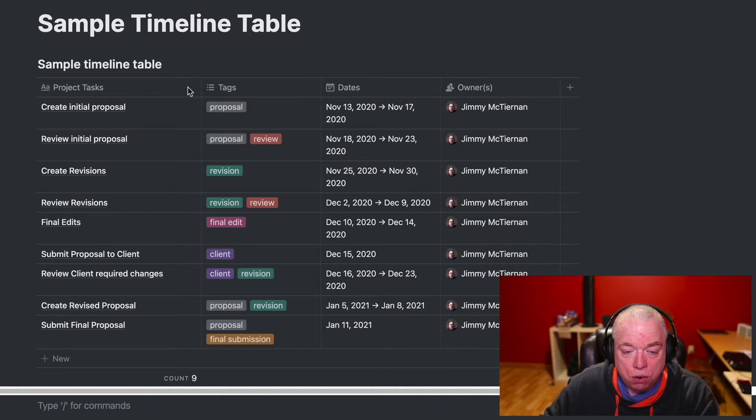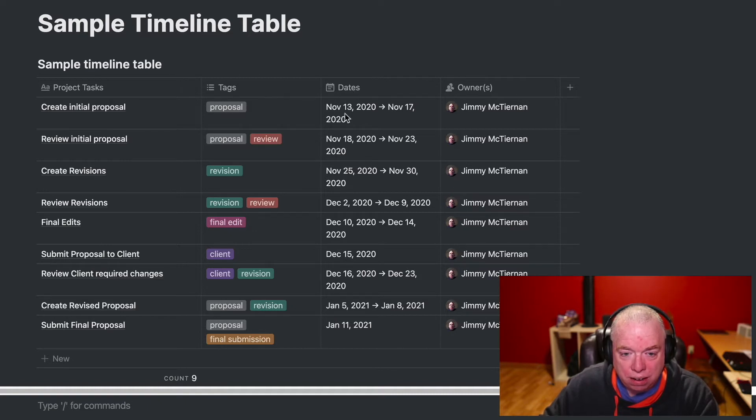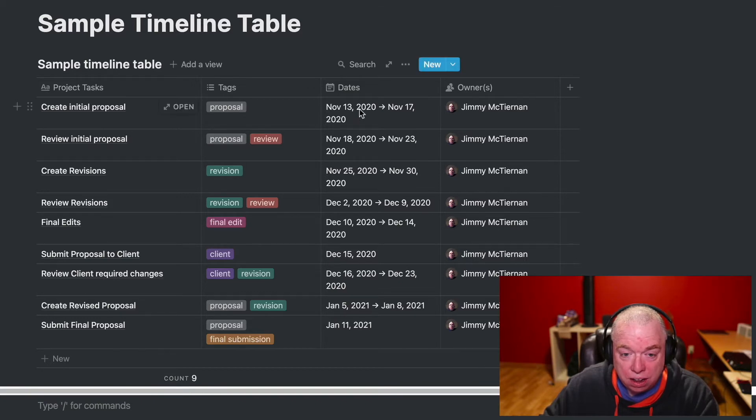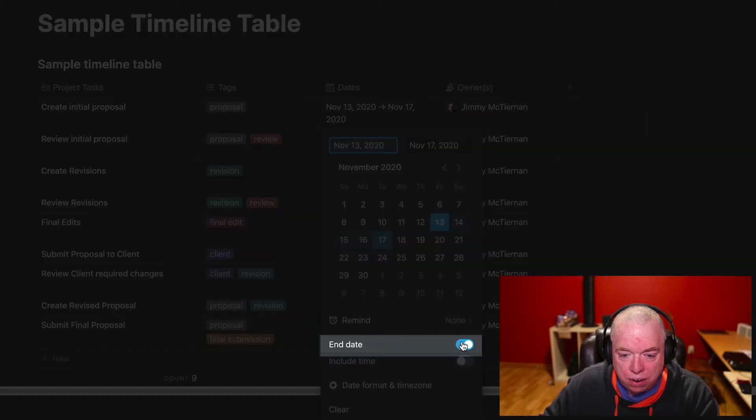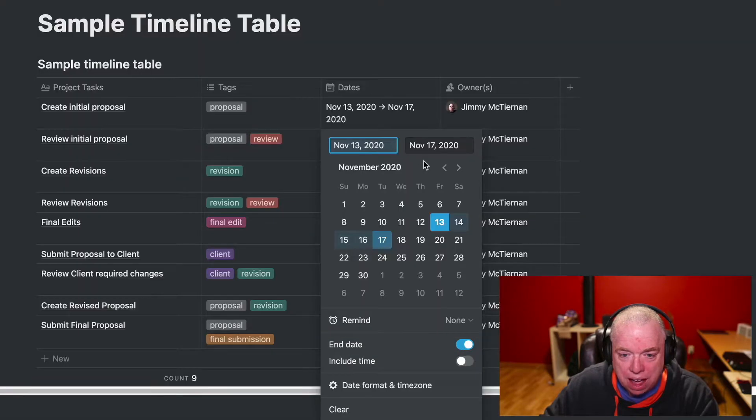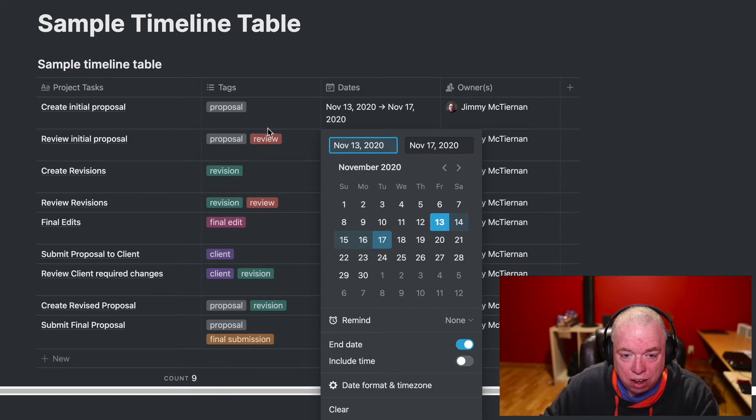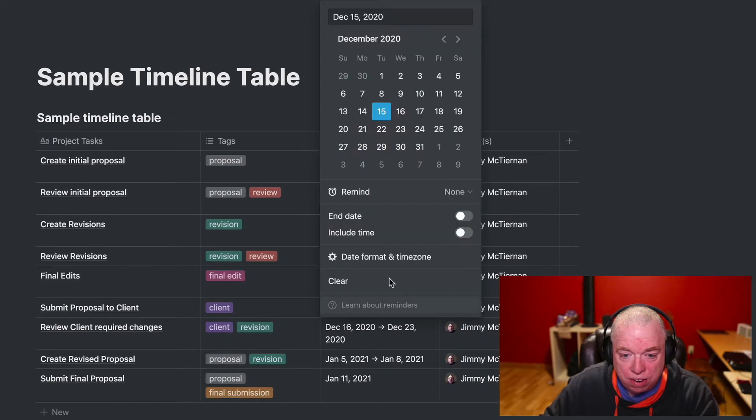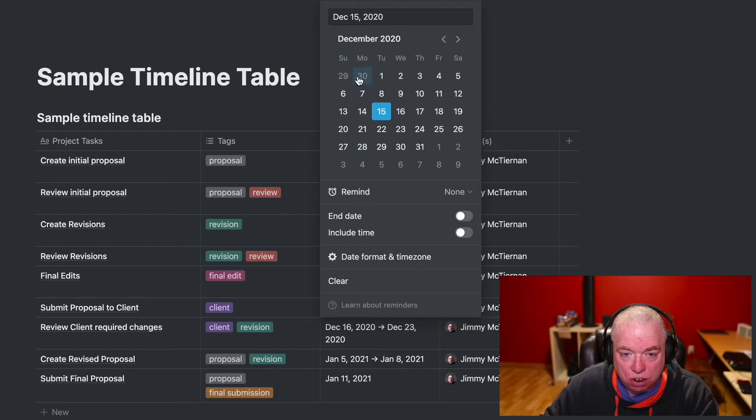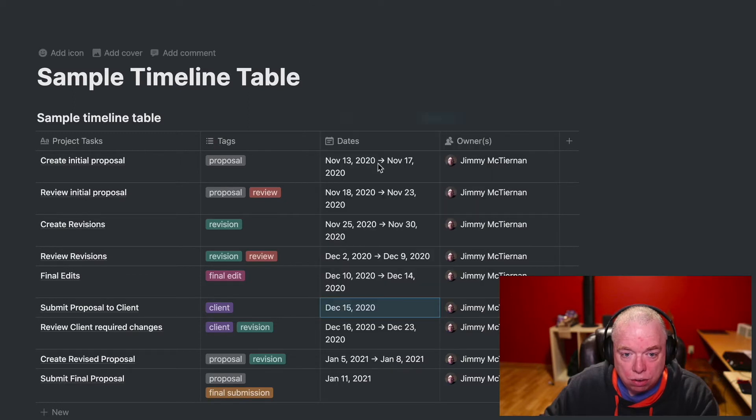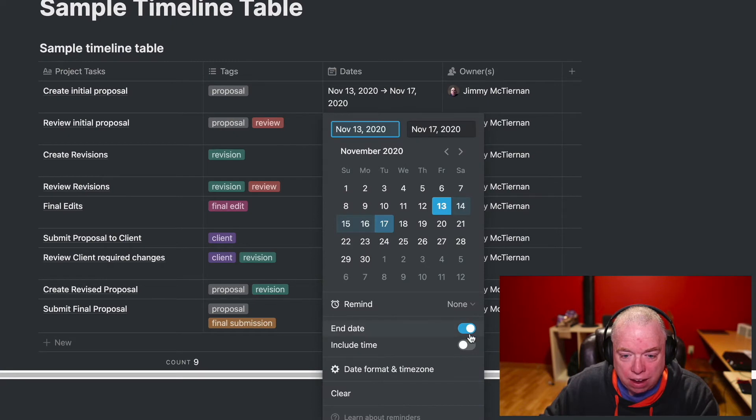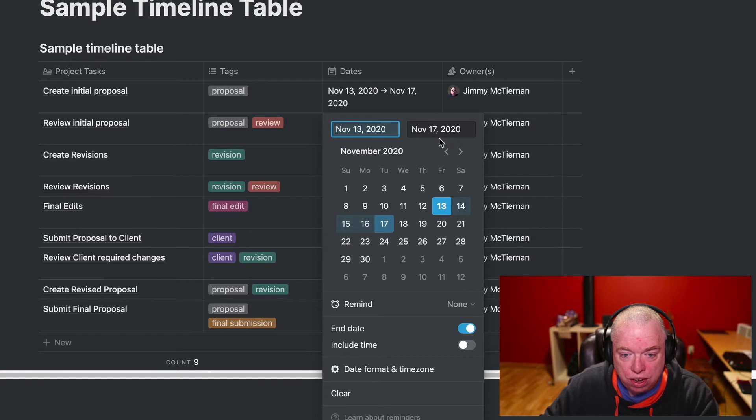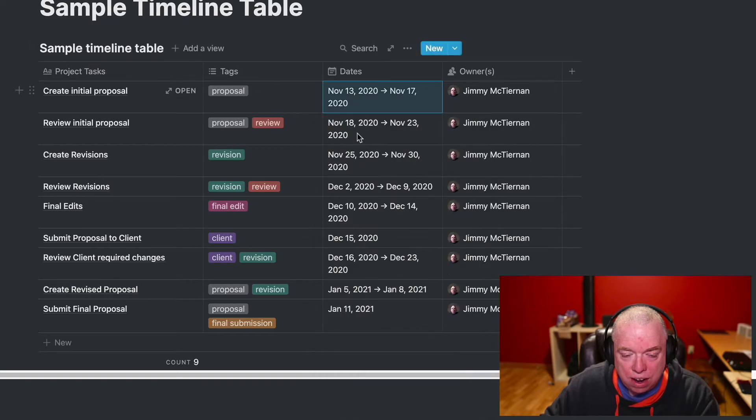The way you create a date range in Notion is to create a date column, just like you would if you just had a single date. Click on it, and then down here where it says end date, when you enable that, that enables this secondary box. Conversely, if you have a single date, you can see where it's not clicked. You just have the one date, which is the actual start date. Going back, you can see I have this tick mark here for the end date. And as a result, I have a start date on the 13th for this task and this end date of the 17th. And I've done that throughout.